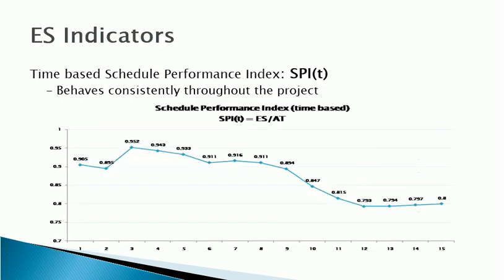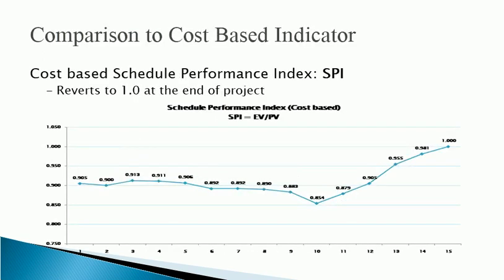Similarly, time-based schedule performance index SPIT behaves consistently through the project, ending at 0.8, indicating 80% schedule efficiency at the end. The cost-based schedule performance index SPI concludes at 1.0 at the end of the project, implying perfect schedule performance. This again is counterintuitive for a project finishing late.